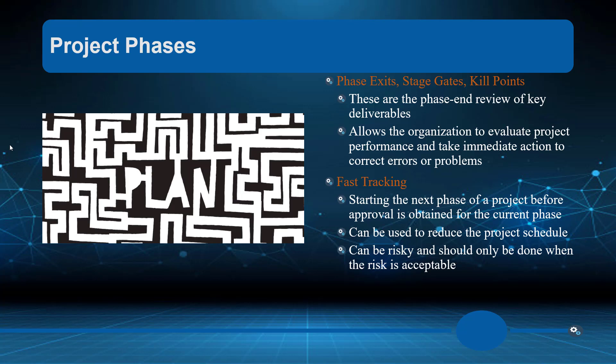I've spent time marketing the project — delivering to the people who are going to be affected or expected to use the system what great work we're doing, when they're going to see the product or service, and how it's going to positively impact their work and their dedication to the company. This allows the organization to evaluate project performance, take immediate action, correct errors or problems if they exist — asking those questions. Fast tracking means starting the next phase of the project before approval is obtained for the current phase.